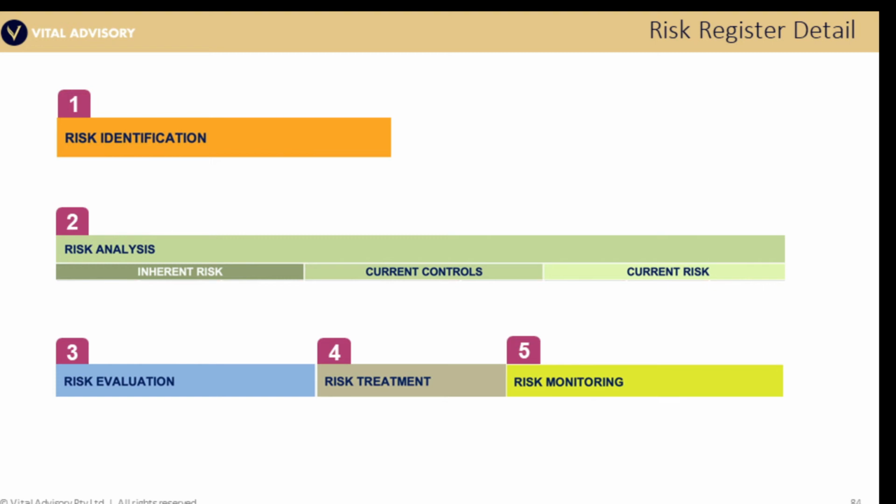So the second part of the register, the risk analysis part, you'll notice these map the 5 steps. Risk analysis, capturing the inherent risk, likelihood, consequence, and inherent risk rating. The current control, whatever documentation you need there, maybe in detail, maybe just summarized, maybe a single statement. And the evaluation of its current effectiveness. Because for each control, they're implemented to a different level of quality.